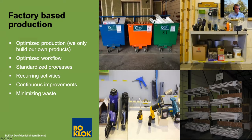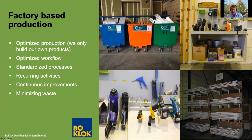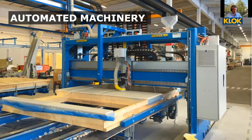Here are just some examples of factory-based production. In some ways it feels obvious that a work site should be this clean, but if you've been to any construction site you know the reality is that construction sites are not this clean or optimized for production. Here you can see the workstations. You can start to invest in specialized tools and start having kitting or pre-kits to be assembled — so you have everything put together and you don't have to make any cuts at the assembly station.